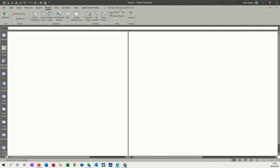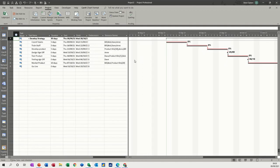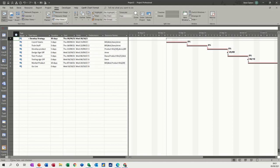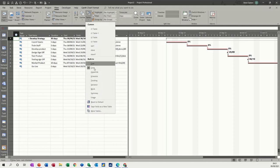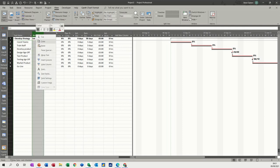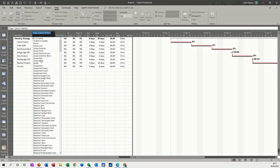The tracking Gantt shows you the baseline marker and the actual, so you can see both of them on there. Then what you can do after that is change this table to be the tracking table, so View, Tracking.